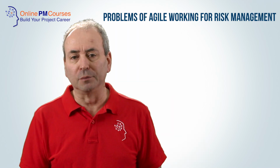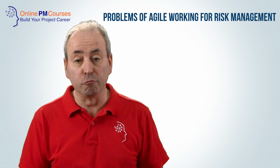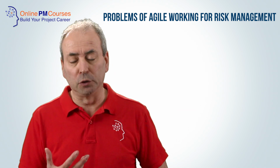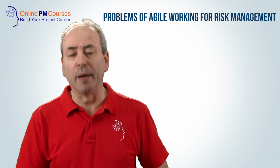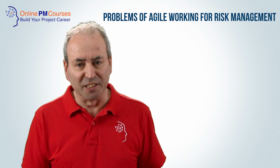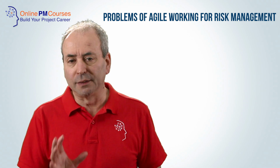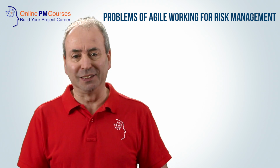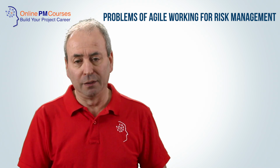There are some real benefits that Agile offers to the risk management of projects, but there are also some problems as well. The first of the problems is that there is often no clearly defined risk manager or risk owner. The entire team is responsible for the risks, which could be a benefit, but it could also lead to people within the team shedding responsibility. That is to say, because everyone else has responsibility, then I can become complacent and not take my share of that responsibility.